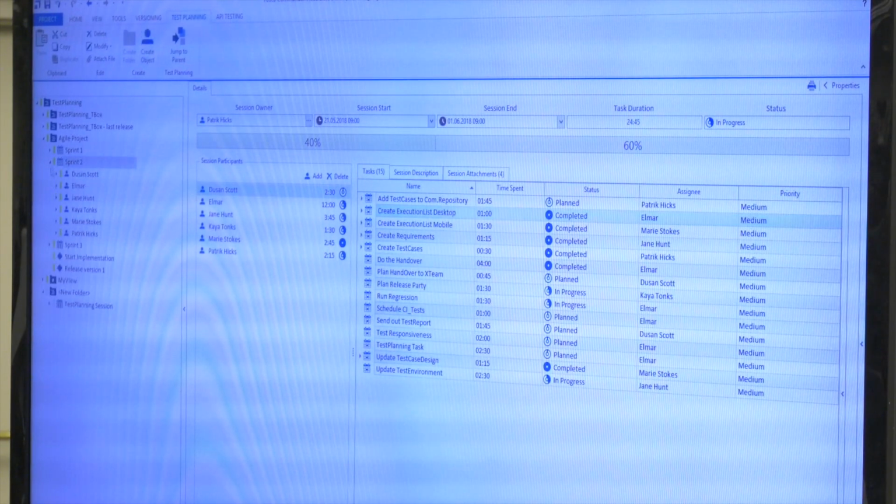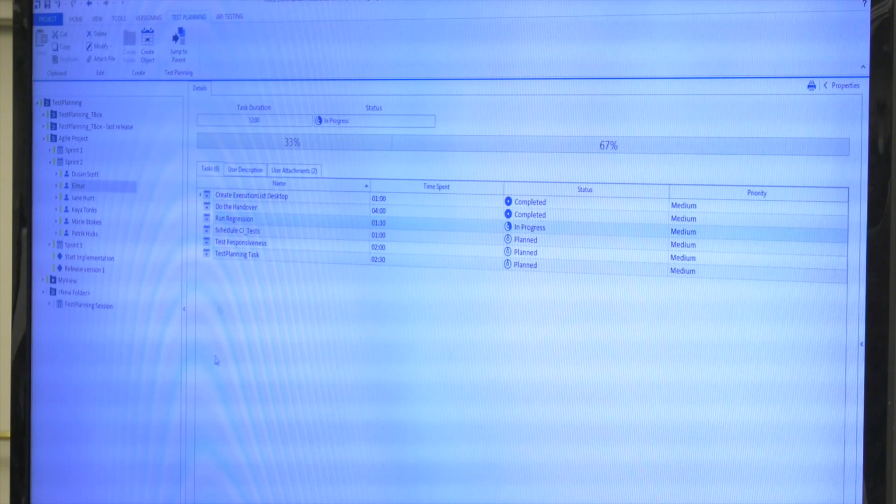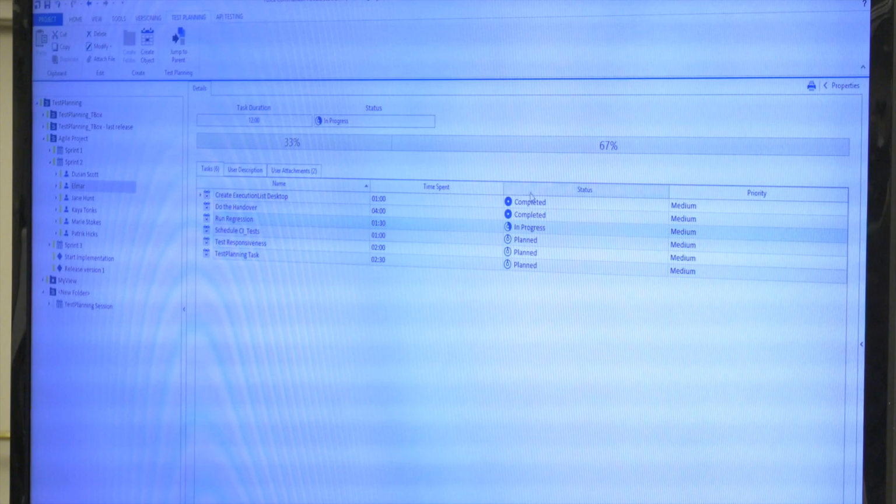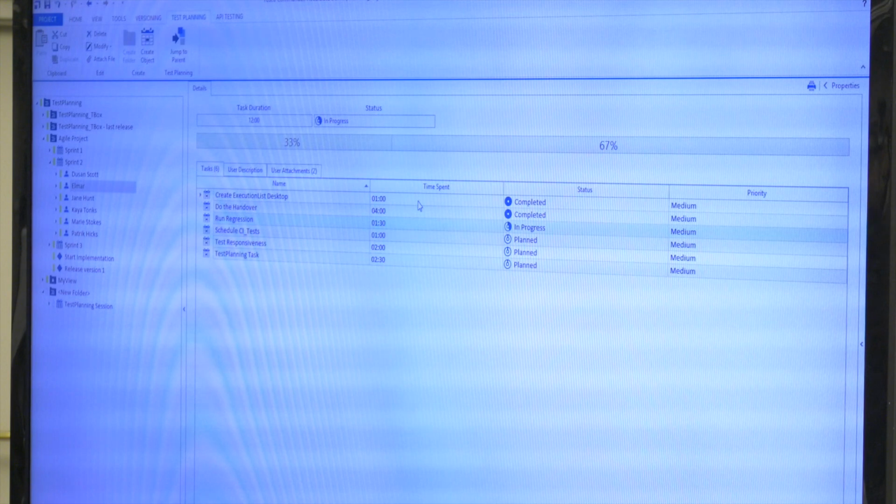And for example, let's look at my user. I have a couple of tasks assigned to me. I already started to work on some, so some are already completed. Something is in progress, and this is not even touched yet. And I can also say how much time I invested. So this is meant for tracking the actual time that was invested. It's then easier for recurring activities to say, okay, last time we invested 5 hours, next time it's maybe the same on the same level.